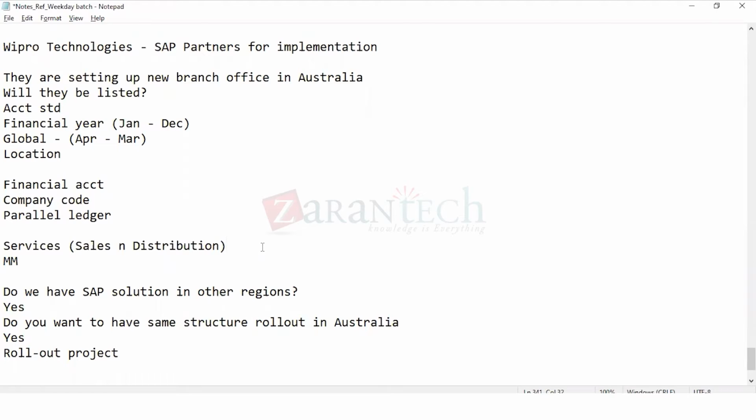For example, they're delivering the project over 12 months, and maybe they will do part billing. When they complete, let's say, milestone one, some step of the project, they bill 20% to the client, then 40%, then 40%, something like that, right? The revenue will only be recognized once the actual event occurs, so they might have some concept of revenue recognition which can come in.